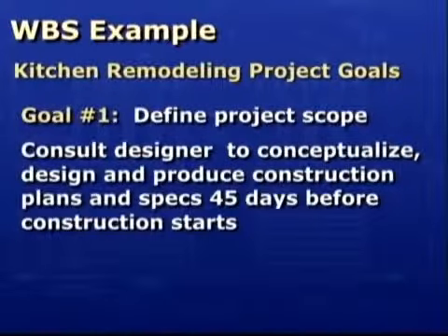My first goal is to define the scope of the project. I will then meet with the contract designer to brainstorm ideas, come up with a comprehensive design, and then produce construction plans and specifications for the project. I set a deadline for this goal of 45 days before beginning the first construction phase.